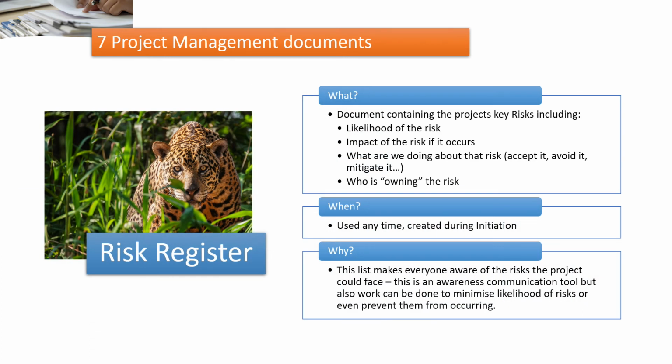When? Used anytime. But we create it during the initiation. It is key during the initiation, as I mentioned. I don't want to repeat myself too much, but a risk could be so big that we just decide we don't do the project at all. So this list makes everyone aware of the risk of the project could face.